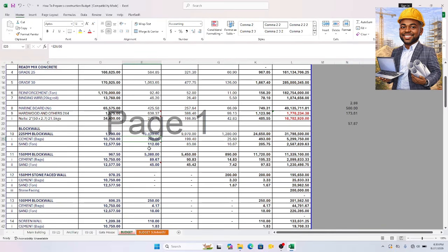now practically, a 50 kg bag of cement will lay conveniently 50 blocks. That is 5 square meter. Right. So if you come here, this is it here. Total number of blocks is this. Divided by 50, you will get the total number of bags of cement. Total blocks is this, divided by 50 blocks, which is 5 square meter. I have the total bag of cement.